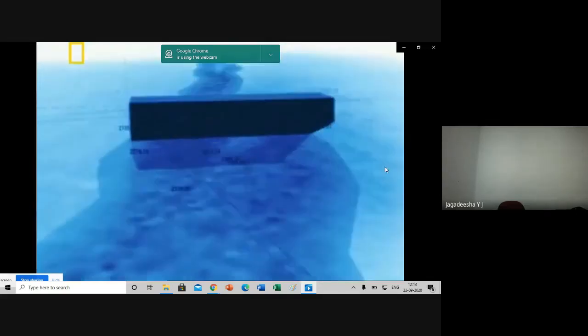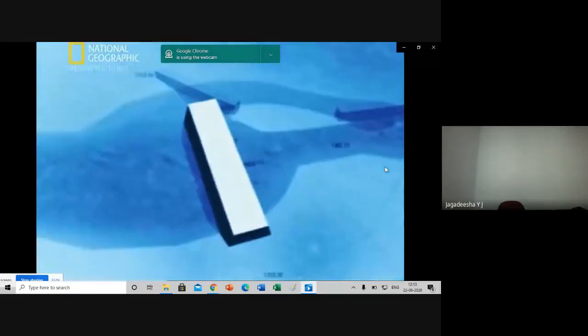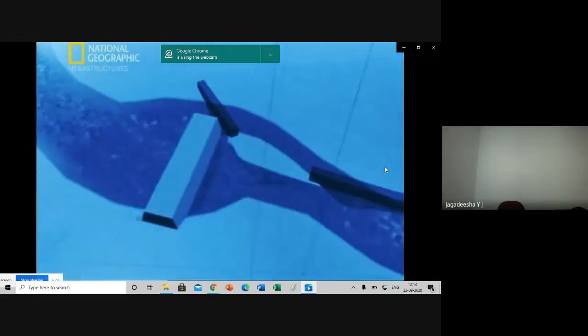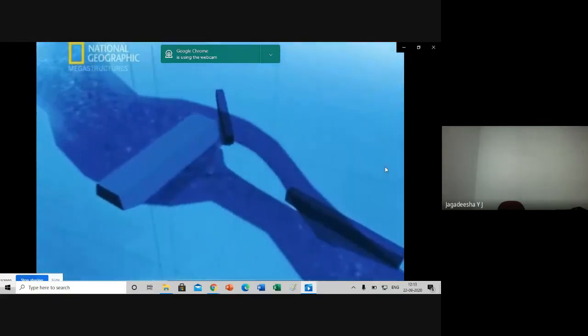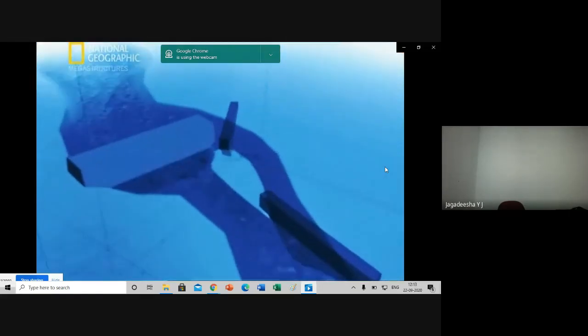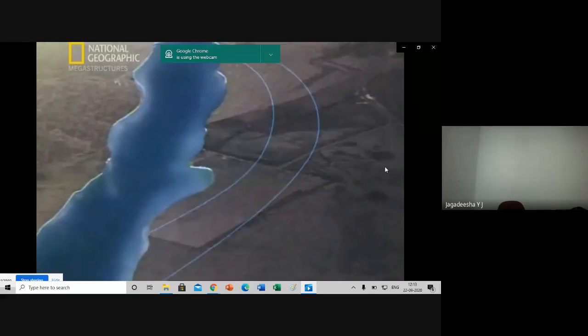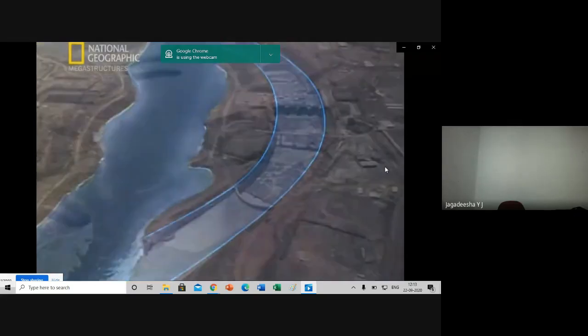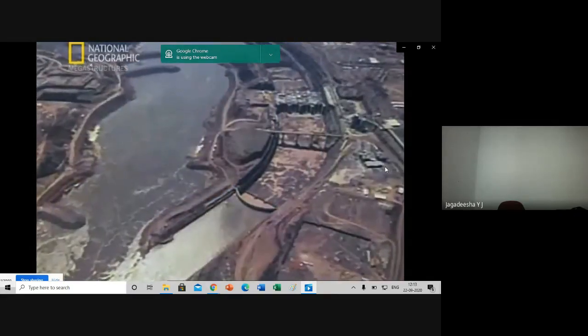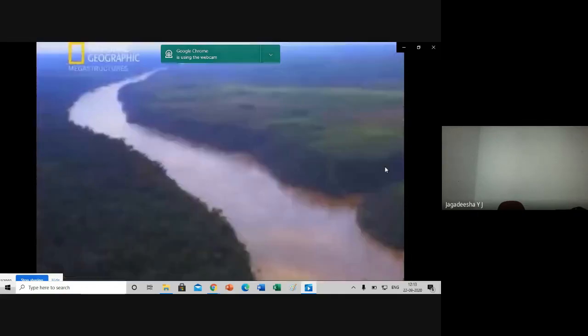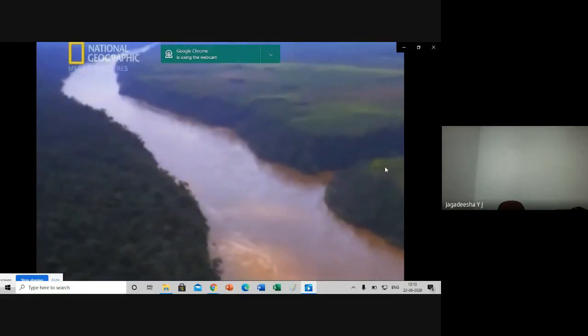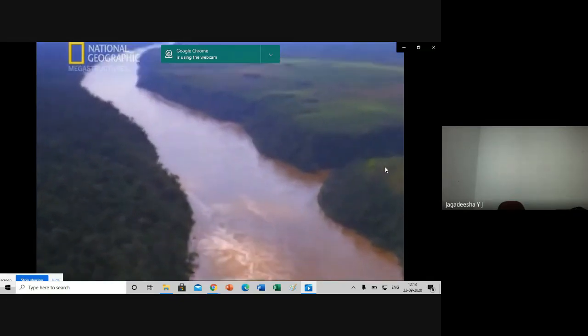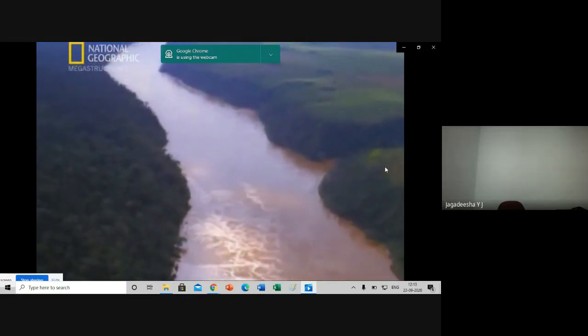Engineers found a site on the river that seemed perfect for the dam. But to build it, they would first need to divert the Piranha from the course it had flowed for thousands of years and reroute it. A massive diversion channel had to be carved through the rock of the riverbank to temporarily divert the river away from the dam construction site. At 2 kilometers long and 80 meters deep, it was the biggest diversion channel ever attempted. If it failed to divert the river correctly, the whole project would be doomed.